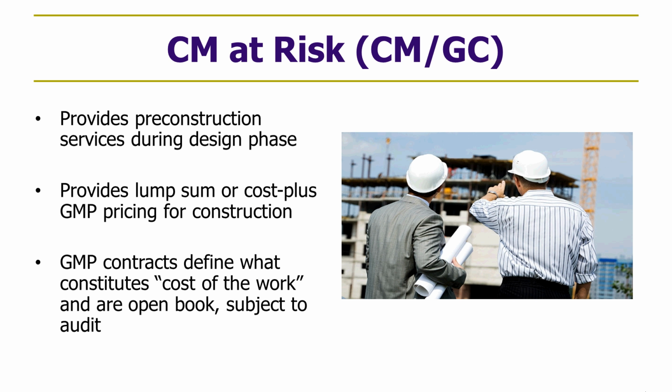It's got a unique feature in that the contractor is involved early in the design phase rather than first appearing on the scene at the start of construction, as traditionally was the case. These are typically negotiated contracts with an expectation, but certainly no promise of involvement of the contractor beyond the pre-construction phase. The conventional wisdom for CMAR contracts is that they are general contracting with a few pre-construction services thrown in. I think it goes a little bit deeper than that, at least with sophisticated parties.